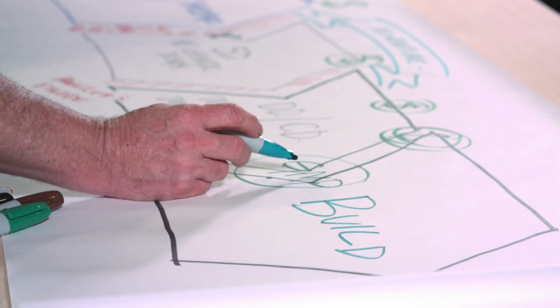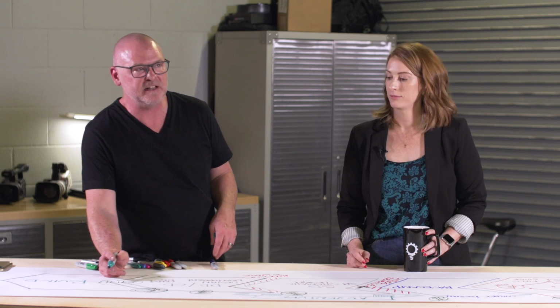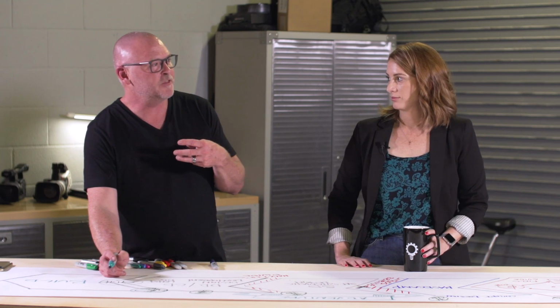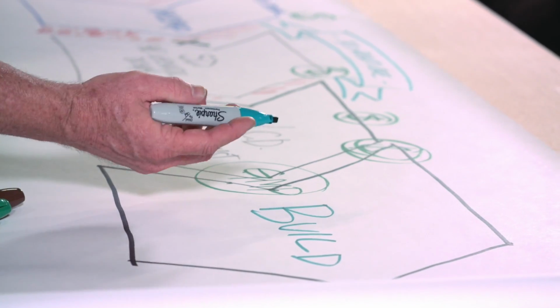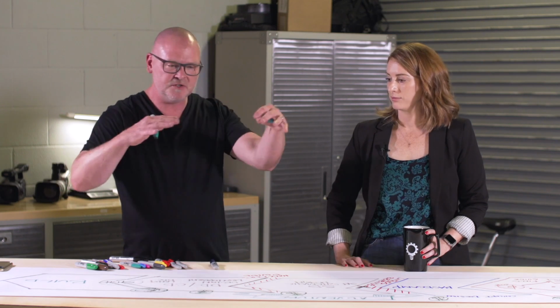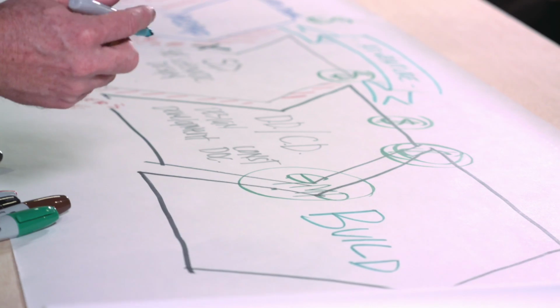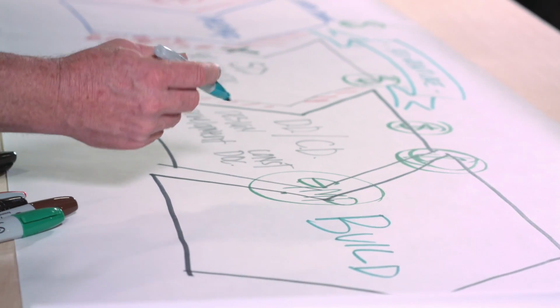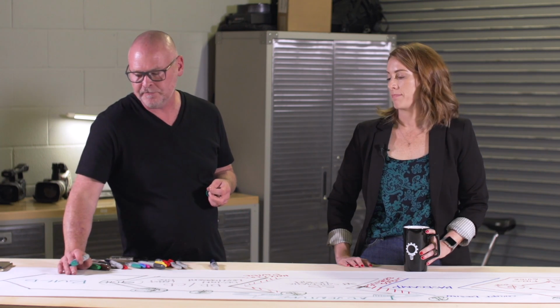This is the spot where we actually send the project out. We go 3 and 4 deep to the local guys. So there'll be like 3 or 4 bids to the drywall guy, 3 or 4 bids to the plumbing guy, right? That's just how it goes down. We bring in all those bids, we choose who's gonna win the project, we add it up, we add percentages on, and then bam, you have a guaranteed maximum price. And that's a completely transparent process. As much as you want to be involved, you can be involved in that.